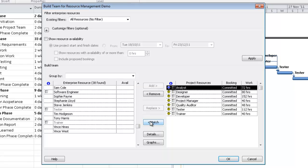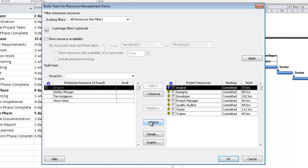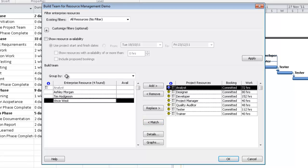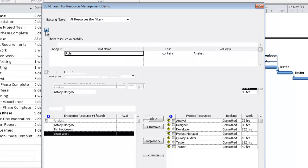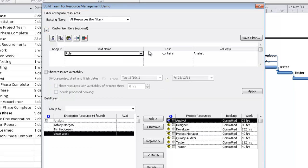If I leave it selected as our list, I see the list on the left-hand side of all my enterprise resources. Now in order to find an analyst, I don't have to go through the list—all I have to do is click Match, and here I'm presented with a list of all the people within the organization that are analysts. If I click on Vince West and his filter option, I see that Vince has the value of analyst against his name. That's only a single attribute; you can have multiple attributes like certifications, location, anything at all.